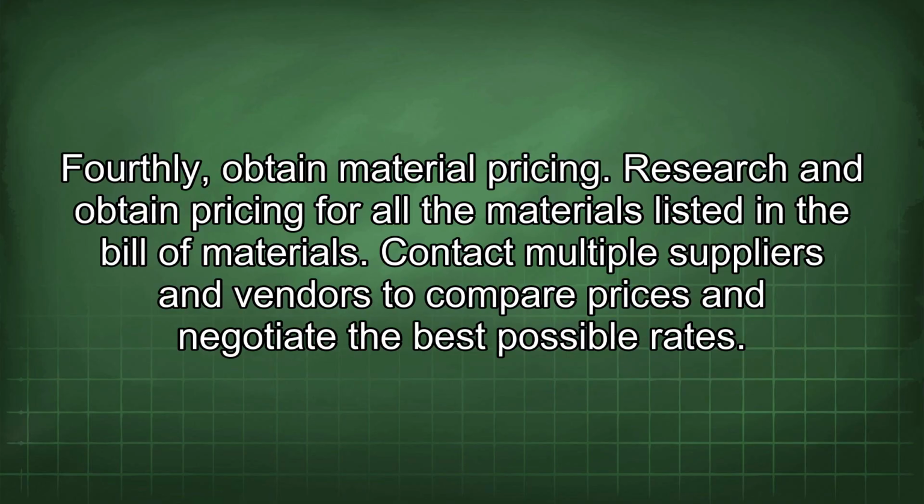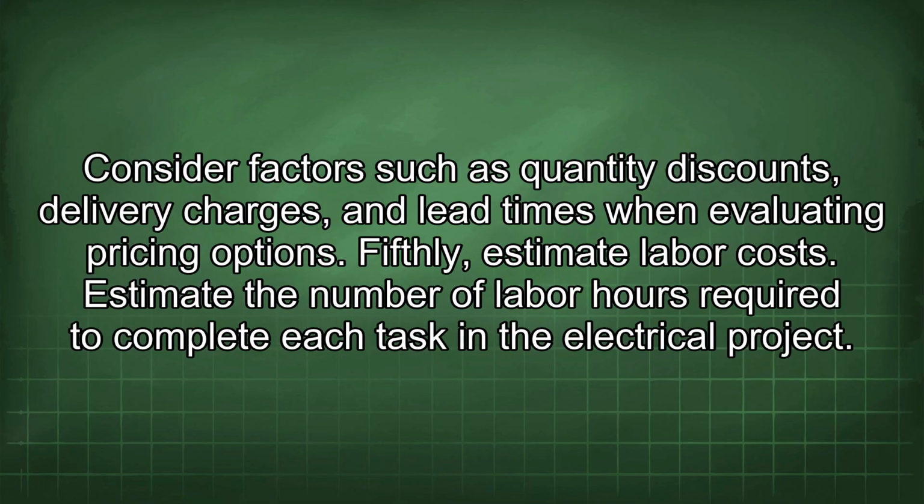Fourthly, obtain material pricing. Research and obtain pricing for all the materials listed in the bill of materials. Contact multiple suppliers and vendors to compare prices and negotiate the best possible rates. Consider factors such as quantity discounts, delivery charges, and lead times when evaluating pricing options.